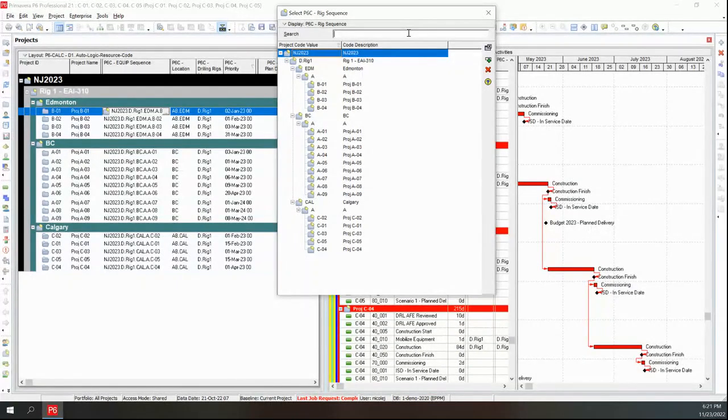here on the project. So if you've ever worked in an area where it's very dynamic, like a turnaround could be another example, where you might have 20, 30 work phases. Let's say you're opening up equipment, and let's just use valves as an example. Perhaps you have 20, 30, hundreds of valves that you have to take out during a turnaround. You know that you don't always have a particular order that you need that done in, but you do know that you're going to do them in some sort of priority. So you could have it auto rearranging your code.